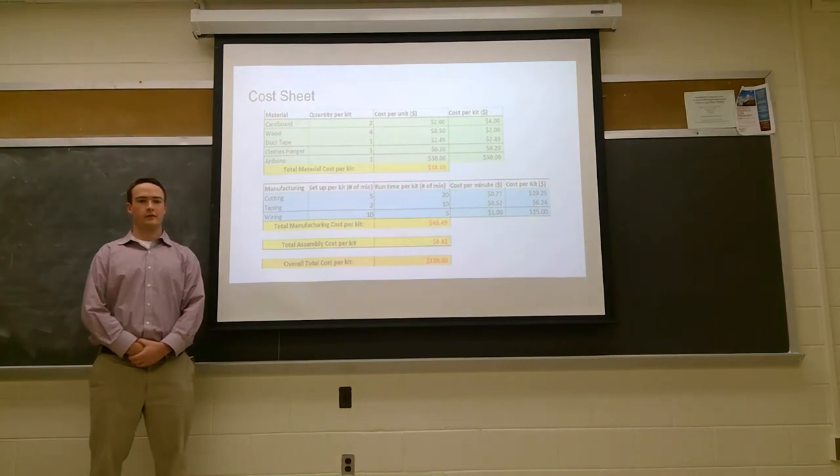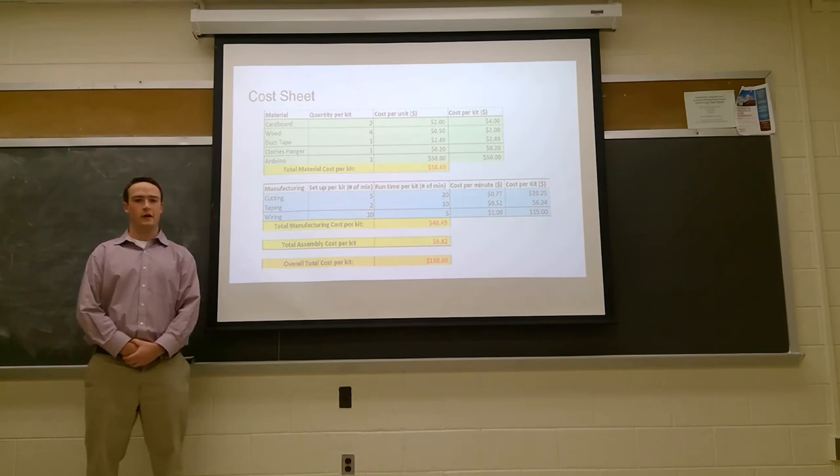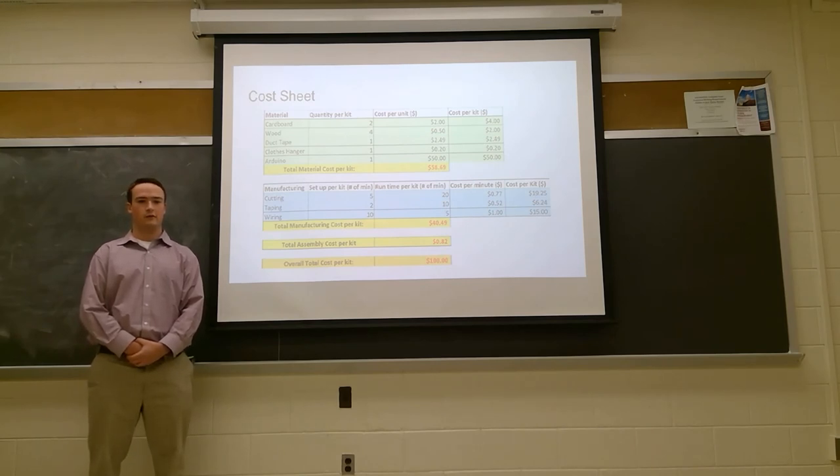Our cost sheet depicts price estimates with materials and manufacturing in mind. After purchasing the material from hardware distributors, the team found the necessary quantities of material along with the respective costs for the BRG kit. A total manufacturing cost per kit of $58.69 met the team's expectations as the price for the Arduino for each kit was known to be significantly more expensive than other materials. The team then analyzed the manufacturing methods used during physical creation of the BRG and estimated the respective labor costs per minute depending on the skill level required. Taking into account total material cost per kit, total manufacturing cost per kit, and total assembly cost per kit, the overall cost per kit was then estimated at $100, which was expected as it was used in calculating projections and investment proposals.